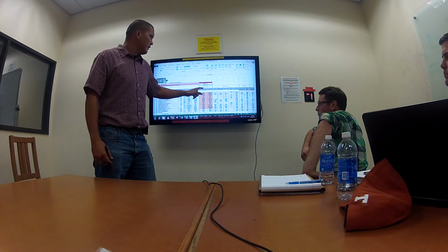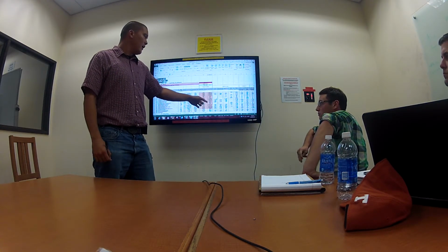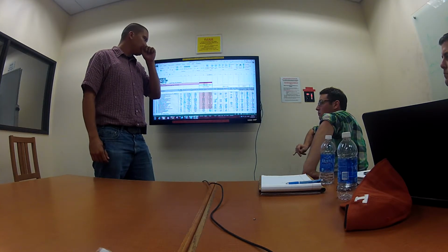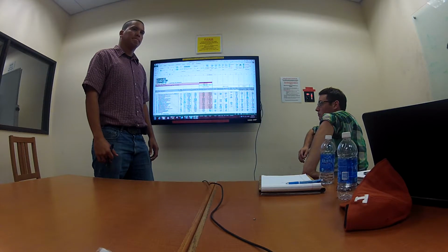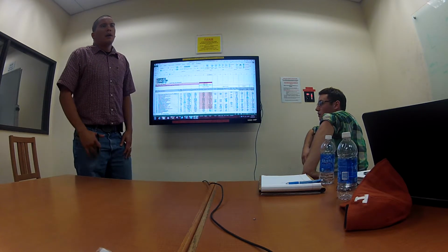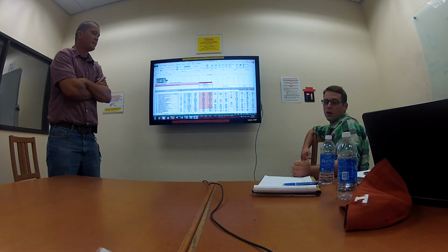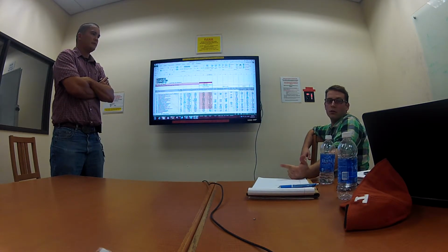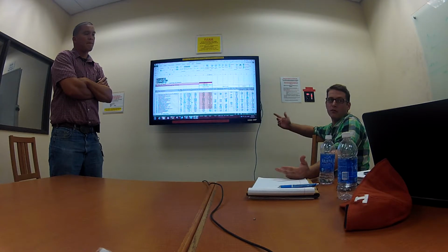Once you lock it in, you highlight it, you ink those ones in, and you can lock these so you can't make changes to them. How do you know if you can close them out early? You don't want to close any of the sub items they've given you. You don't want to close any of your own items. Pretty much anything that they've given you already, once things are going to change.